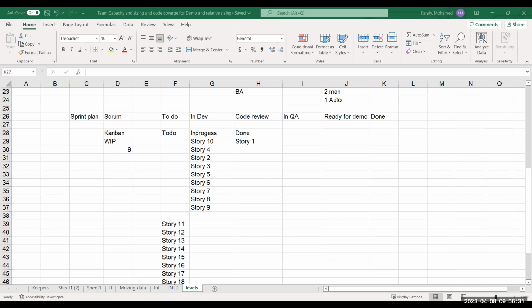What about grooming? The product owner, before I joined this team, told me that this team struggles with grooming, and that they do subtasks and hours. So I walked the team through what relative sizing is, and they agreed that we're going to use story points and we're not going to use subtasks, and we're not going to use any hours. Coming to the point that actually brought me here, which is definition of ready and definition of done.